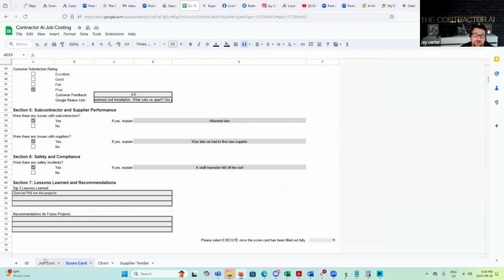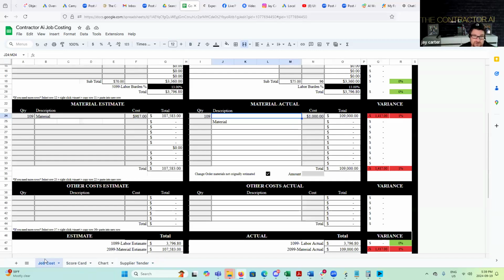If you can pay your suppliers, because what's their problem? What's their issue? Cash flow. Receivables. So here's what I've done. When I'm doing really big jobs, I go to my client, Mr. General Contractor, Mr. Developer, Mr. Whoever, and I say, in my contract terms, I'm going to give you back 1% if you pay your bill within 15 days. He says, hey, that's great. That goes right to my bottom line. I'm going to take that. And good clients will, because they got the money. It's not a problem. I'm going to pay you in advance.